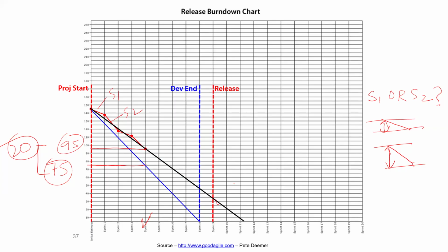Let me name the black line. What do we call it? Call it forecast of remaining work. So this is the forecast of remaining work. What this black line conveys is, the way things are moving, we need another 3 sprints to complete this amount of work. We're significantly behind. So it's a forecast. That's all about the burn down chart. In a burn down chart, we draw these 3 lines together and it tells us the progress visually: how much behind we are, where we land up, all of it. If you have a question on the burn down chart, ask.